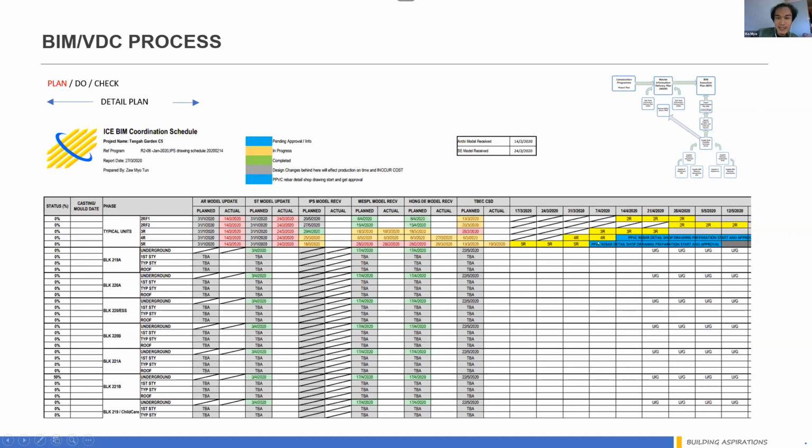Then we realize, okay, our site must be finished at which date. Our submission needs to be done when. Then we say, okay, to do this, we need our subcon to be finished, the UR test, something like that. So basically, plan back everything from the master plan, driving back all the activities together with your capability.